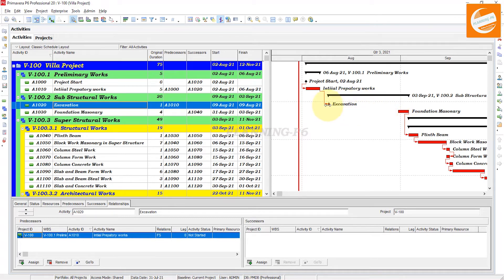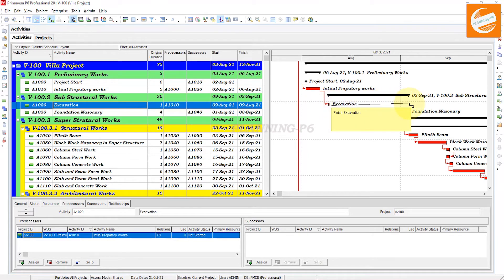Now if you want to assign a new relationship — like Finish to Finish or Start to Start — just assign a relationship by drawing it in the Gantt chart.